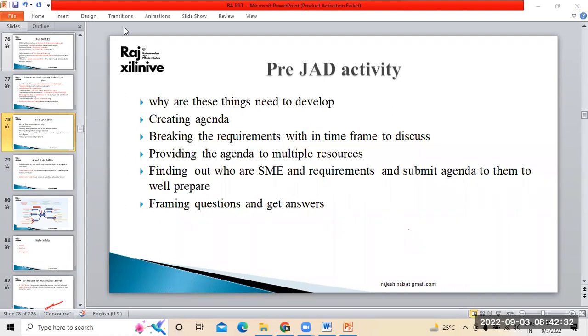We have to follow a discipline in such a way where the customer, whoever is involved in the project, either external stakeholders or internal stakeholders, first of all, we have to invite them. So we'll frame the questions first. Who is going to question and who is going to answer? And how much time are we giving? Normally, fundamentally, we give not more than 10 minutes. Seven to 10 minutes is what will be given by us.